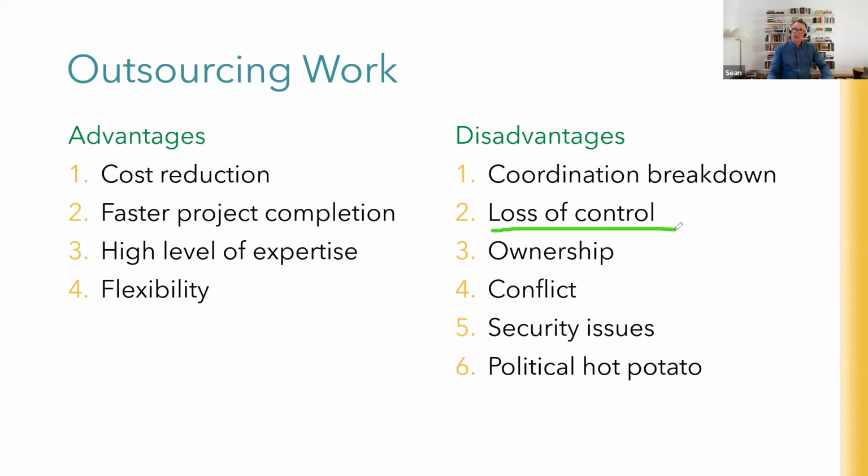You may experience a loss of control. They'll tell you when they're going to deliver it. They'll tell you what their constraints are. And if they change their mind, there's not much you can do about it. You can renegotiate the contract or try some punitive actions on them, but you can lose control once it's outside.